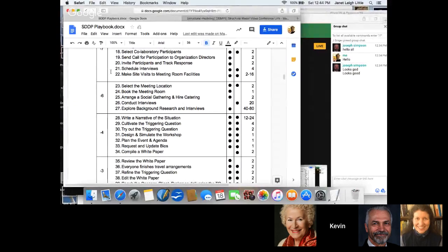But in this case, we were working with an organization that everybody was looking to for leadership on this topic. So they were hungry to be invited. So we thought, you can do it with 2 months minimum, but we wouldn't try to do that if we didn't have an organization that had pull in the field. You need much more lead time, especially if people are flying in.